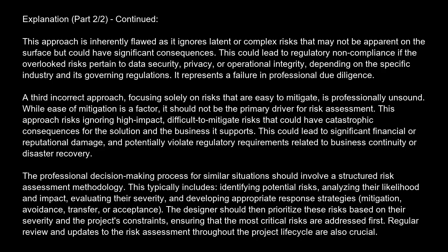The professional decision-making process for similar situations should involve a structured risk assessment methodology. This typically includes identifying potential risks, analyzing their likelihood and impact, evaluating their severity, and developing appropriate response strategies: mitigation, avoidance, transfer, or acceptance. The designer should then prioritize these risks based on their severity and the project's constraints, ensuring that the most critical risks are addressed first. Regular review and updates to the risk assessment throughout the project lifecycle are also crucial.